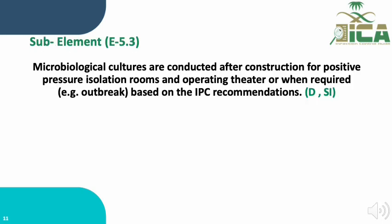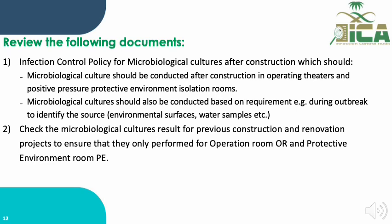Sub-element E.5.3 states that microbiological cultures are conducted after construction for positive-pressure isolation rooms and operating theaters, or when required — for example, during an outbreak based on the recommendation of the IPC team or outbreak management team. This statement must be audited through document review and staff interview. Documents to review include the policy on microbiological cultures and the situations that require obtaining them, ensuring IPC recommendations are followed.